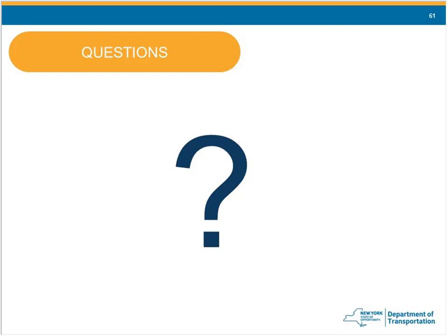Oh, real quick before I end the recording, if we have a betterment share, can we use a decrease item to offset the value? Only if it's within that betterment share. You cannot cross your shares. You can't balance an increase in Verizon by giving back work from O&R or your gas company, for those of you that aren't in Region 8. We will follow up with that next week. I think it would be important to remind people we can't borrow from Peter to pay Paul, and we can't offset an increase to Peter by taking money away from Paul.